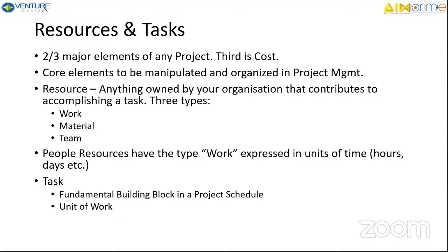These are the core elements that are to be manipulated and organized. The definition of a resource is anything that is owned by your organization that contributes to work or contributes to accomplishing a task. Okay. So material is a resource. Work put in by somebody is a resource. And the team, individuals of which will actually put in work, is a resource. When you have a person as a resource, you see work as the type over there, and that is expressed in units of time, either in hours or days and so on. So the fundamental building block in any project schedule is a task.